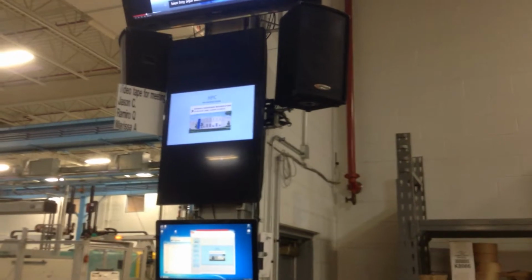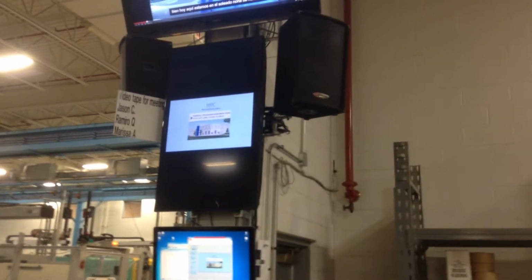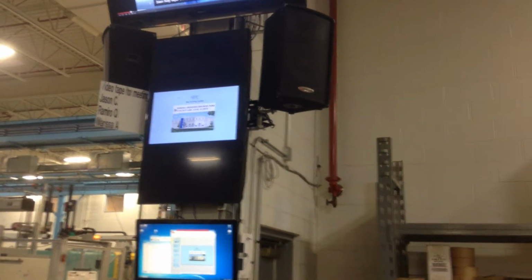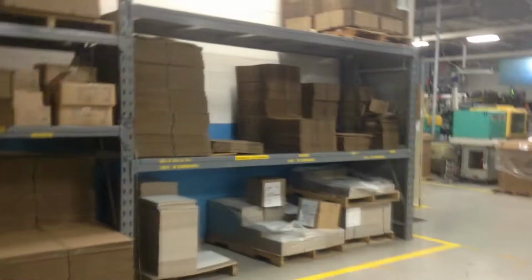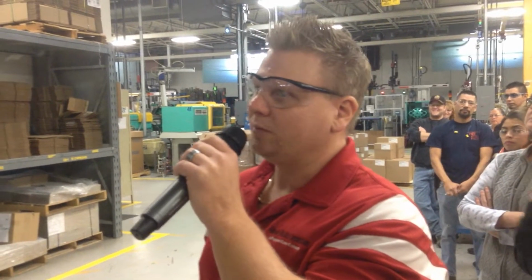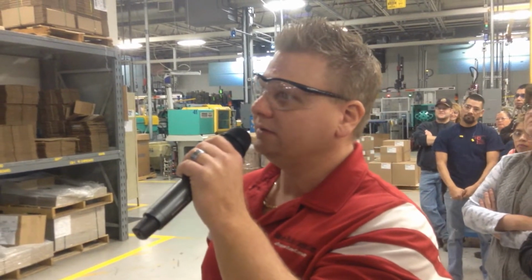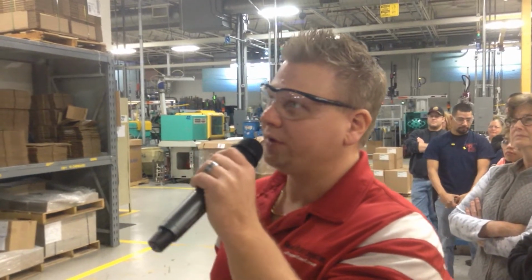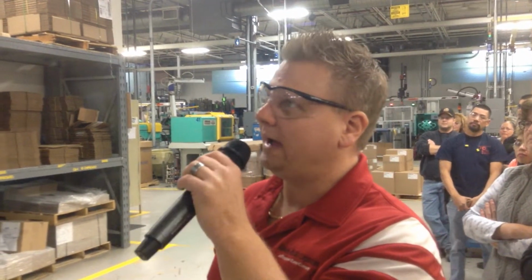I'm not going to do any pictures today, but what I'm going to do is give a brief overview of the building project and what's going on with it. So right now, some of our key highlights. Our goal is to start moving machines on 3/1 of next year. We don't have that much time left. We're about 43% into this process right now.